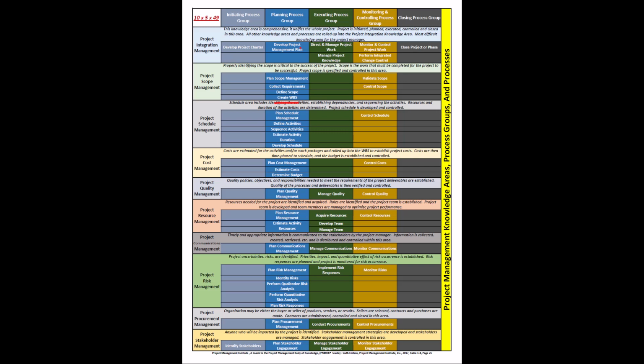Well, the Create WBS is where we take the scope statement and we decompose it down into the work breakdown structure. We'll have branches in our work breakdown structure of things that need to be done. We'll have control accounts. We'll have different things associated with that work breakdown structure. However, the lowest part of the breakdown structure is the WBS work package.